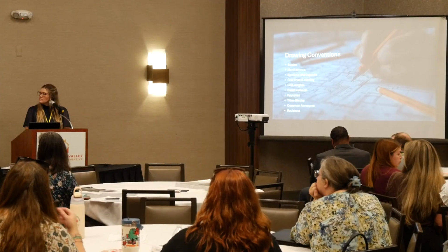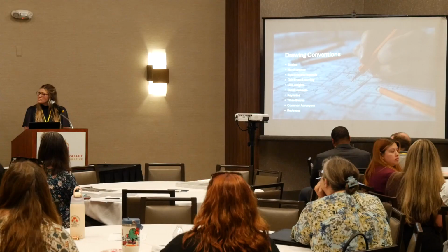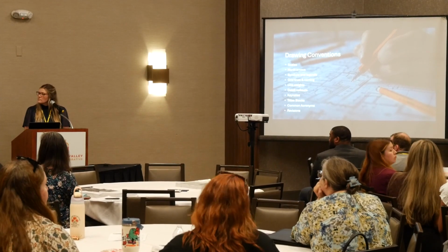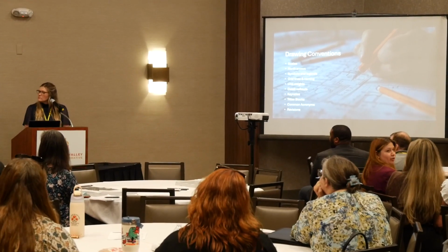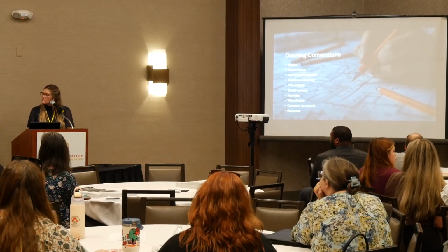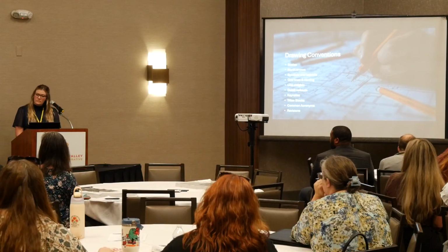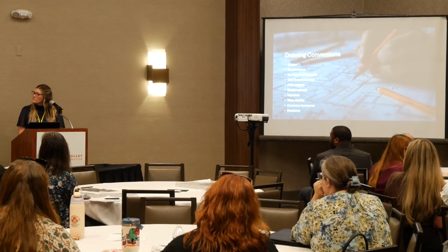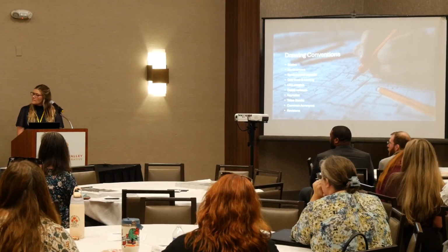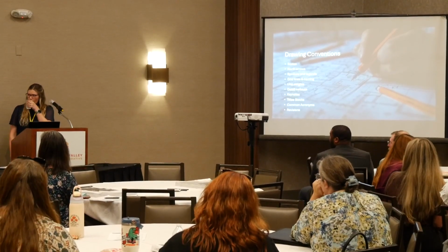We usually do a percentage for each. Like when we get into CDs, we'll say we're at 50% CD with this set. Maybe the contractor will ask for a 50% CD set to do a budget on, and it'll be the set that the contractor wants to look at. But generally, conceptual design is a short phase, a short period of time. Schematic design maybe a little bit longer, and then construction documents is the longest period of time, because it's the most to do and to document everything.